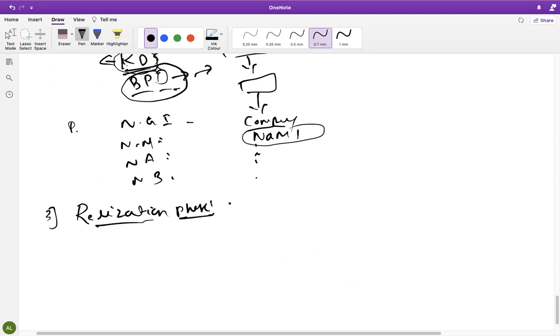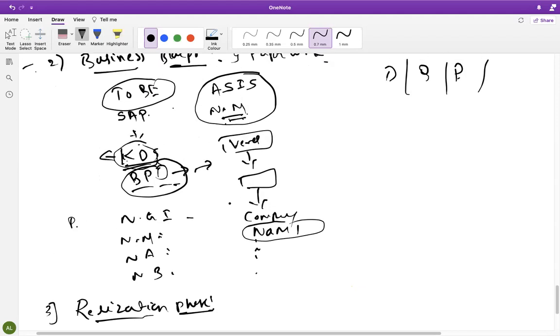Okay, so here in the business blueprint, whatever documents we are preparing, we need to take approval from the Nandini Milk people, the end users or core users, whoever wants. Okay, this is what we are going to do. For your configurations, we'll take a sign off. We have understood your process like this. See the flow charts. Is it correct or not? We'll take a sign off, so that later on they will not make any problem. That's why initially we need to take a sign off from our business side.